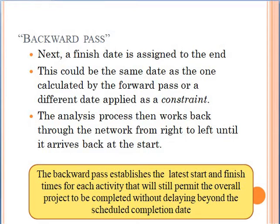We are continuing with the CPM method, but this time we want to see how we do the backwards pass calculations. We will begin from right to left. The beginning point will be the completion time of the project. This date can be the same date as the one we got with our forward pass calculations, or sometimes in the contract it's stated that you must deliver the project at a specific date. So this date will be the point at which you begin the backward pass calculations.